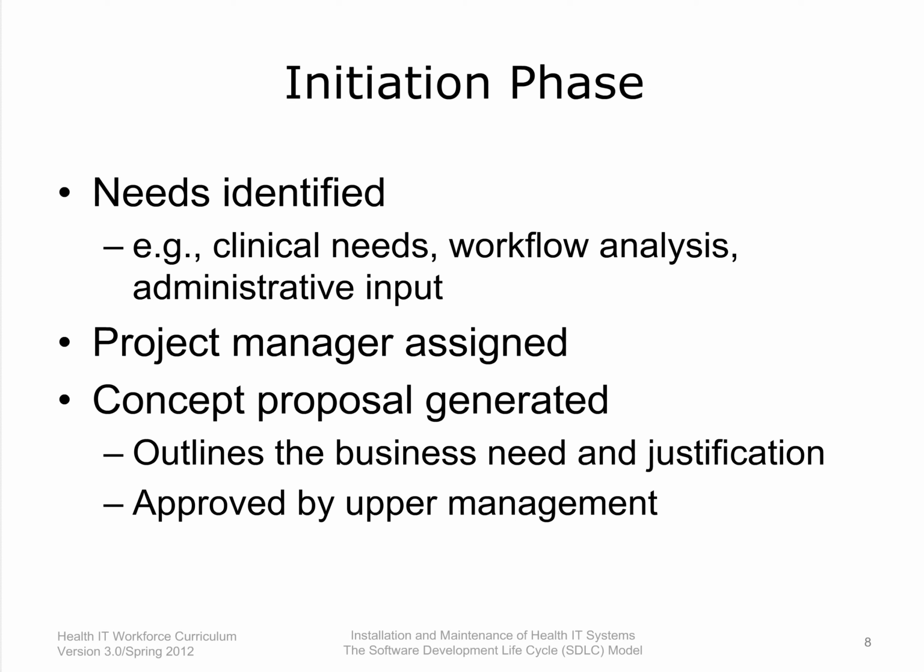A project manager typically would be assigned and would eventually generate a concept proposal, a document which identifies the problem and why the new system needs to be pursued. Upper management would then review the proposal and approve it, and the project moves on to the next phase.